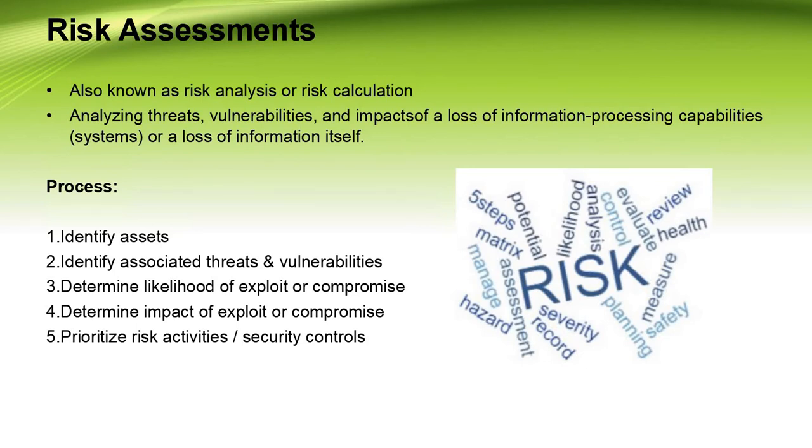A common categorization result from likelihood assessment might be based on qualitative probability of high, medium, or low. Be sure to consider the motivations and capability of the threat source, the nature of the vulnerabilities, and the existence and effectiveness of current controls to mitigate the threat. Often the 3 values are translated into numerical equivalents for use in the analytic process: high 1.0, medium 0.5, low 0.1. I will show you this later on in the video.